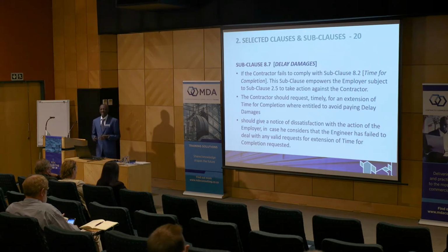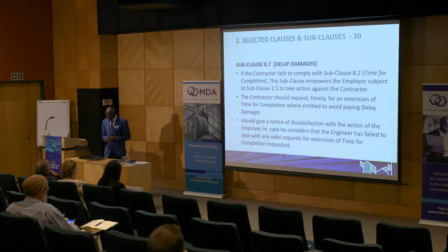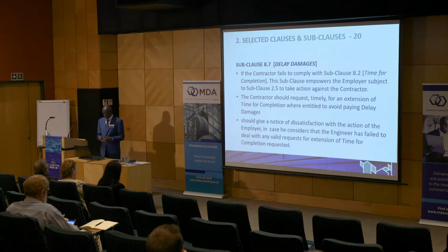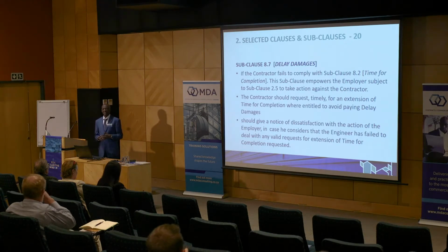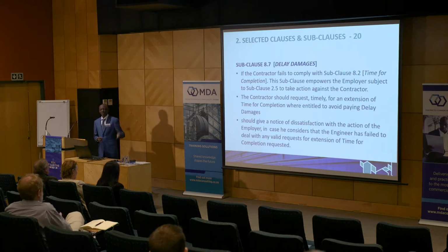The contractor, again, should have people on site who should request in a timely manner for an extension of time for completion where entitled, to avoid paying delay damages. I've seen, especially with private sectors, some contractors rely on the engineer's or the employer's mercy to extend the time.